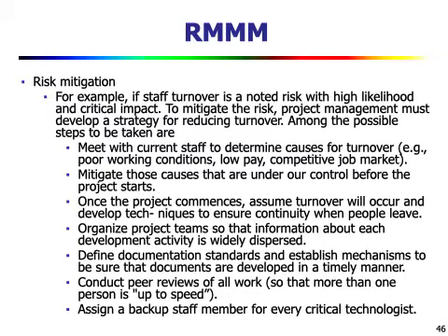Suppose they have high staff turnover as a project risk R1, and based on past history and management intuition, the likelihood of the risk is high, estimated to be 0.70 or 70 percent, which is really high, and the impact is projected at level 2. Then that means it has a high turnover with a critical impact on project cost and schedule.